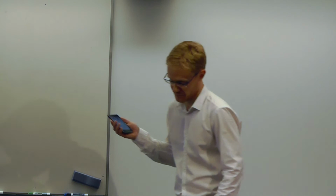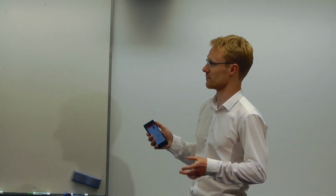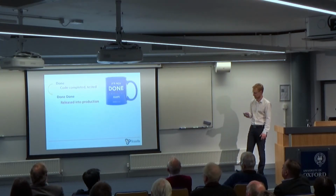In Agile, people talk about being done. Because people say I'm done, but what they mean when they say they're done is they've just completed the code. Maybe they've done some tests if you're lucky. But done is when it's released into production. It's actually being used by the users or the customers.